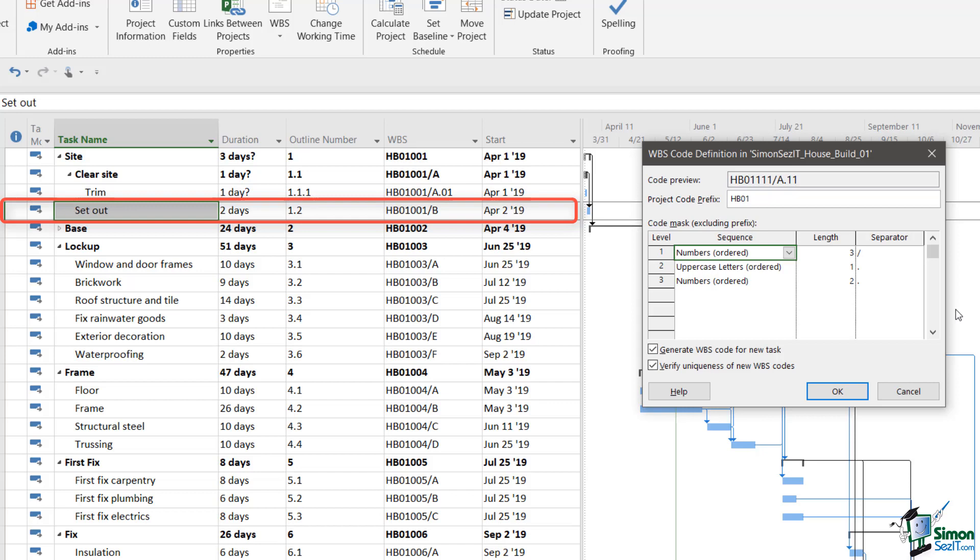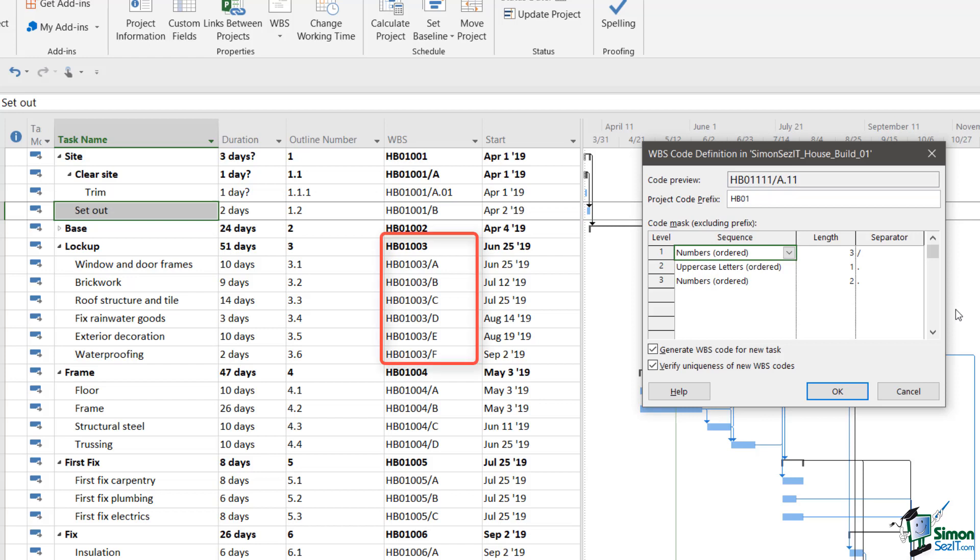There is no third level for this particular task, so its WBS code finishes with the B. If you look at the lockup task here, notice how the numbering goes HB001, 003, slash A, slash B, slash C, and so on. So you can see how that numbering system works.